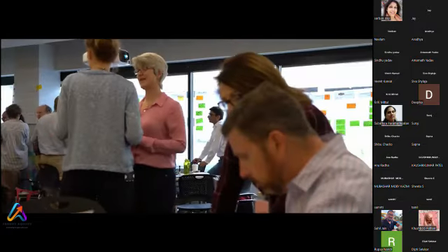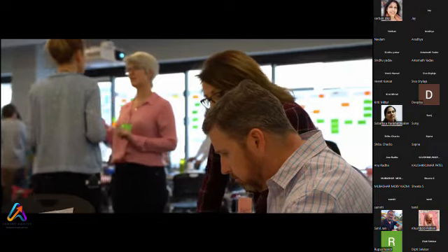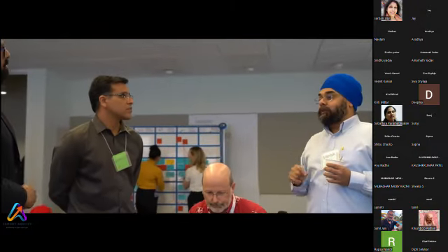We had our business owners come to us and say, look, I know that we have all these commitments, but one of our primary customers has asked us to make a change. We said, okay, what are we taking off the plate of the teams? Because we can't do it all. And SAFe tells us we can't do it all. They agreed that there was work that could be removed.